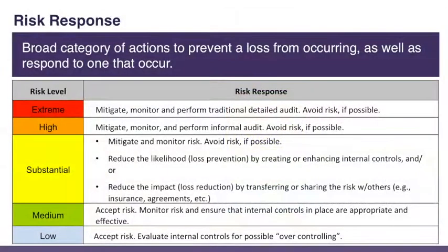The next step is risk response. Risk response refers to the broad category of actions to prevent a loss from occurring, as well as respond to ones that occur. For extreme and high risks, you can avoid the risk by discontinuing the activity or making it impossible for the risk to occur.